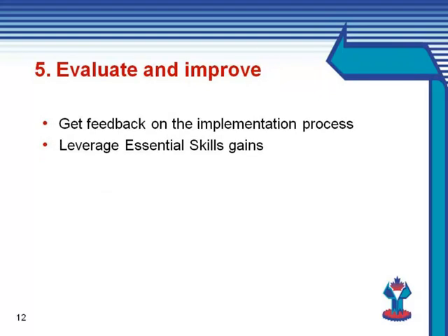We have already covered how to go about an evaluation of essential skills programs in Webinar 3. What was not said is the importance of documenting the results and recommendations in a report. This is an invaluable tool to consolidate the learning and to provide guidance for future essential skills projects. Share the draft report widely and request input and feedback before you finalize it. The results will give you what you need to make changes that will continuously improve your essential skills program.